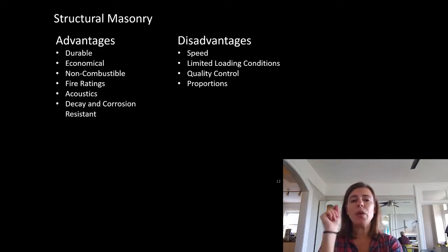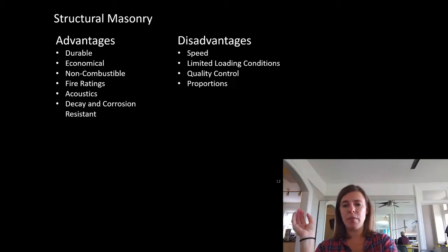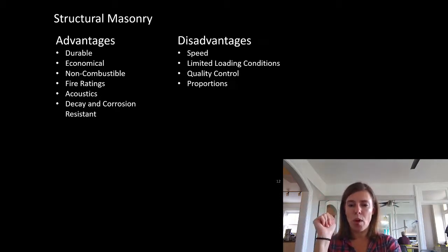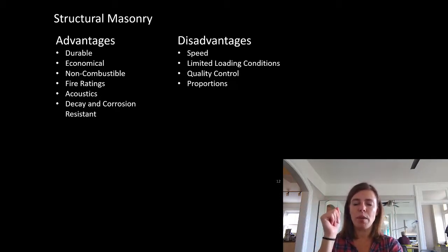This is probably a good place to mention labor cost versus material cost. In the 40s, 50s, and 60s, material cost governed our systems. Labor costs were relatively cheap. So we did whatever we could to take material out of the system by throwing labor at the problem. We solved all of our problems with labor, not with material.